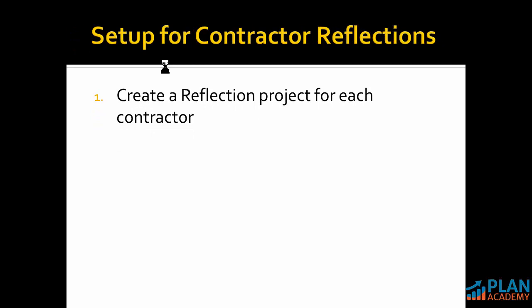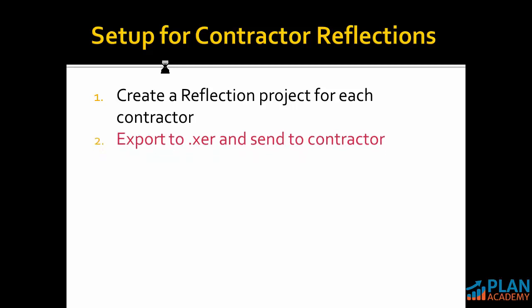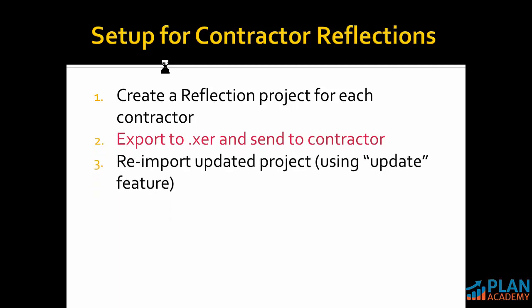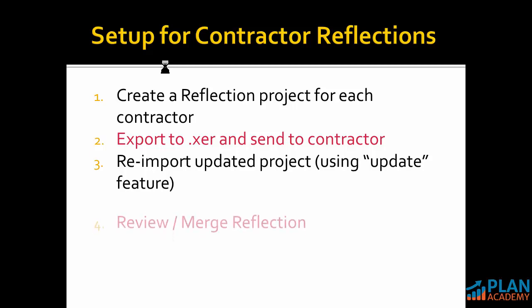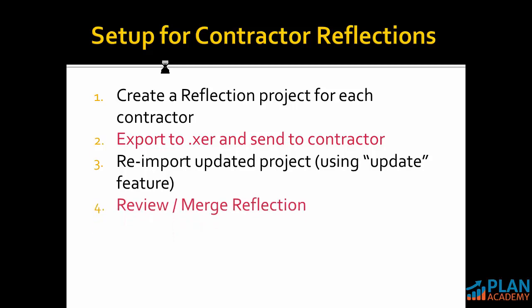First thing we want to do is to create a reflection project for each contractor. If I'm working with multiple contractors, I'll create a reflection for each one. So that's step one. Step two, we're going to export that XCR and we're going to send it to our subcontractor in this scenario. They're going to update the plan and send it back to us. We're going to re-import that updated project using the update feature. Then we're going to review, merge the reflection in. And if we're okay with all the updates we've been sent, we'll go ahead and lock them in by rescheduling.